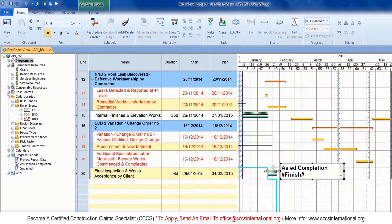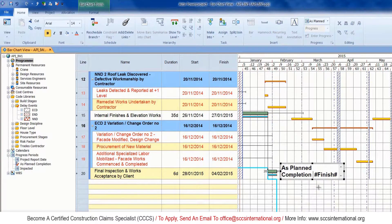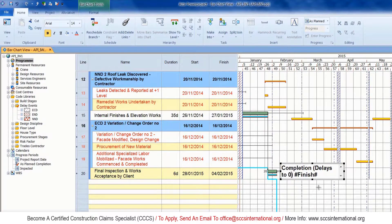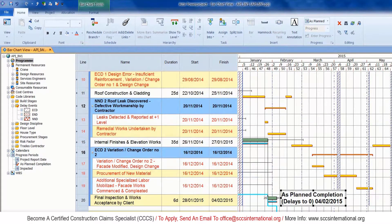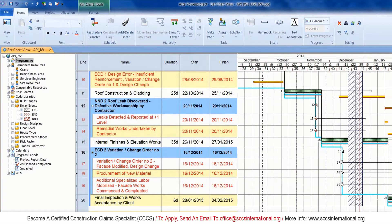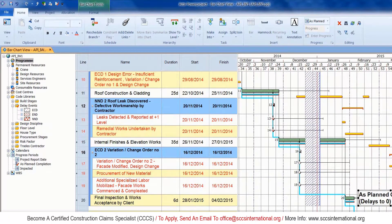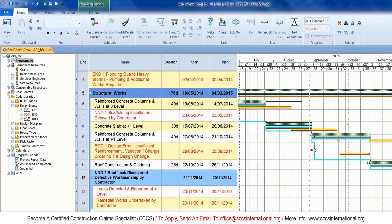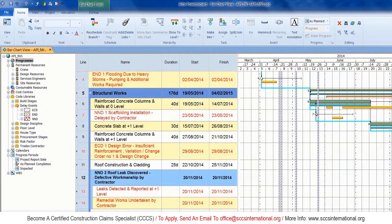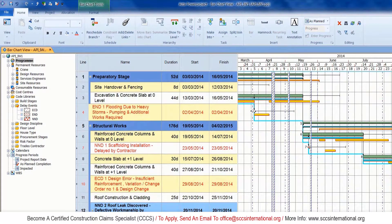All that is left to do is to insert a new progress line and save a final baseline with the as-planned impact completion date. We will also insert a new column called the Finish Variance Column, which will clearly show us the difference between the planned finish date and the impacted finish date. Please watch the rest of the steps shown on screen — after that, you're ready to move on to the next module, which is a workshop assignment.